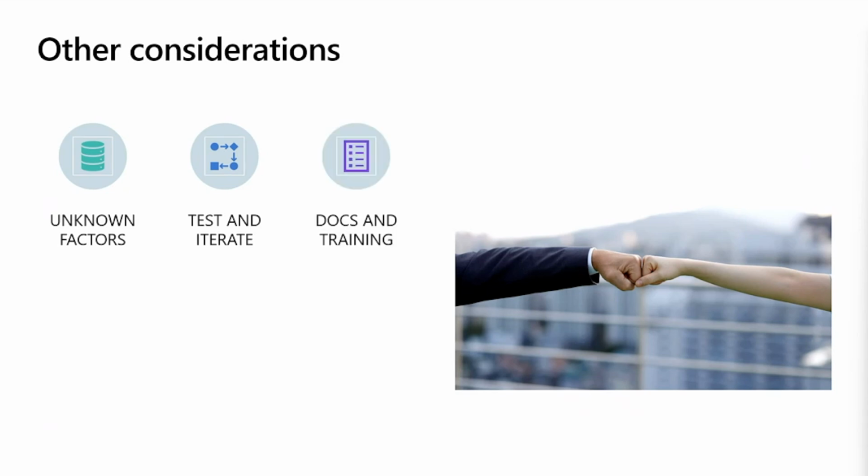You'll also want to make sure that you include time for your documentation and training. These are oftentimes things that are forgotten in that initial estimation process. There's a lot of time and effort that goes into documenting and training your users. Creating training materials can be a very time-consuming process, and don't underestimate the effort that's required there.